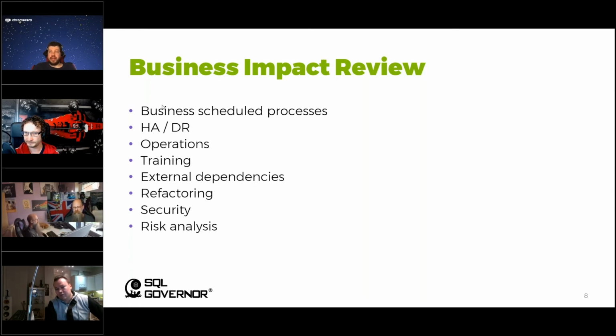Yeah, exactly. And what I have learned is that if there are tens or hundreds of servers or even more, especially in environments with thousands or tens of thousands of databases, it's super important to be able to prioritize things. So also prioritize the external dependencies, which are the most critical applications, which are the most critical servers, instances, maybe even databases, and then start tracking them. Because many times when you do the right 20% of the job, it's 80% done.